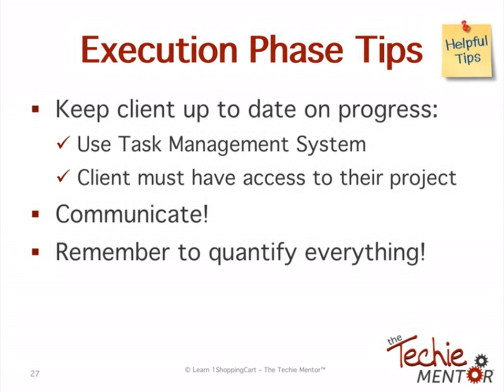Cindy, but it is quantifying how many emails are in the autoresponder. She had 17 emails dripped out in one autoresponder. Exactly. So you can have 5 autoresponders and you can quantify it even further, saying, okay, you can have up to 5 autoresponders with a total of 5 emails apiece. Okay, and I just didn't do that quantification here, but that's what you can do. So that's a good point as well. Make sure that if you do that, you are clear. And I will add that as well. Sorry, I misunderstood your note there. Thank you for bringing that to my attention.